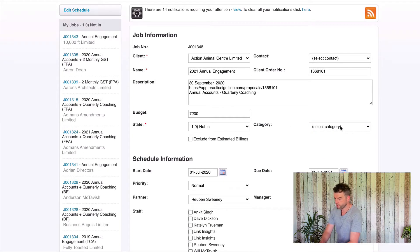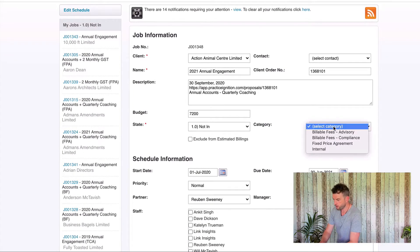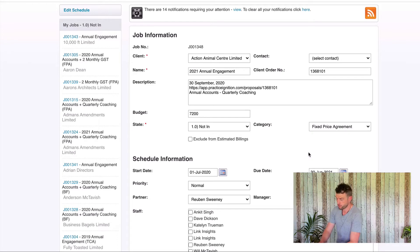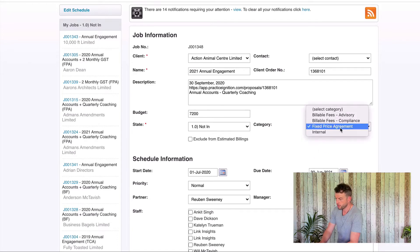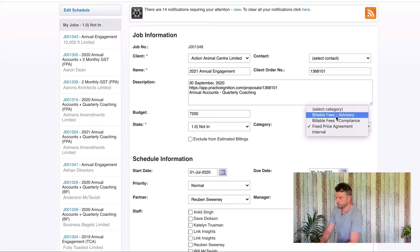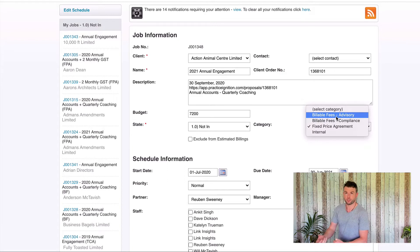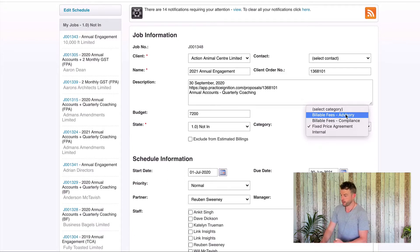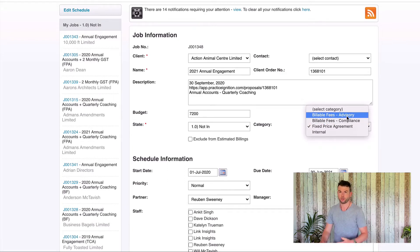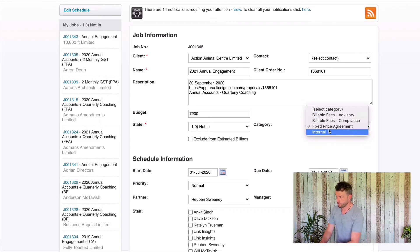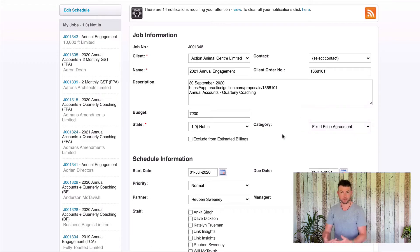My job category hasn't been populated. I know this one's a fixed price agreement so I'm going to choose fixed price agreement for my category. If it was billable fees — meaning we're going to bill it based on timesheets out of Xero Practice Manager — we'd choose whether it's an advisory or a compliance engagement. This one is fixed price agreement because it's being billed out of Practice Ignition.